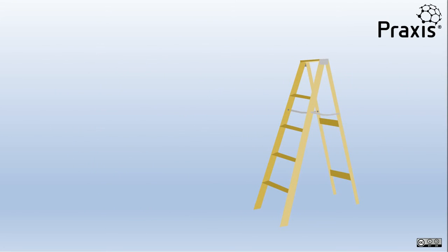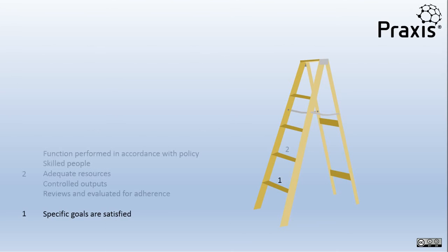Let's take a quick look at the characteristics of the different CMMI levels. At level 1 the organisation achieves the specific goals set for the functional process. On the Praxis website each page starts with a set of goals that must be achieved to reach level 1. If you don't achieve them you're at level 0. At level 1 the goals may have been achieved in an ad hoc way, but at level 2 you will be achieving them in a structured, more repeatable way.